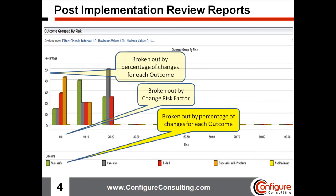Using this information, managers might conclude the risk factor is too low for some changes if most changes are showing a failed review status. Similarly, if a high ratio of high-risk changes indicate the outcome was successful, maybe the risk analysis rules need adjustment. The value here comes by potentially eliminating the necessity to review certain changes, thereby increasing the change lifecycle efficiency within the organization.